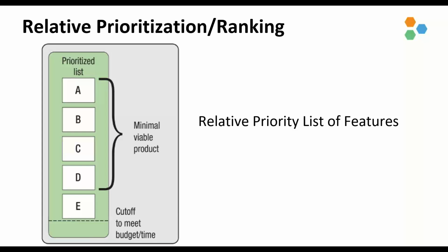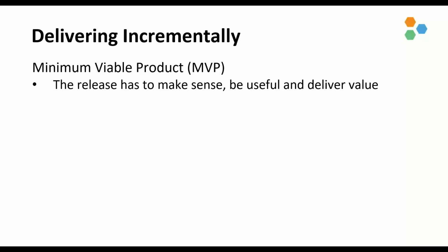And then we want to talk about delivering incrementally. Delivering incrementally is another way that Agile methods optimize the delivery of value. Incremental delivery: the team regularly deploys working increments of the product over the course of the project, like we looked at the very beginning. So the idea really is to deliver the plain vanilla version of a product or service while working on the more complex elements.